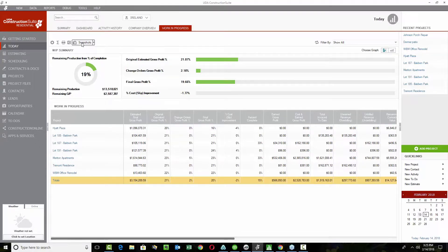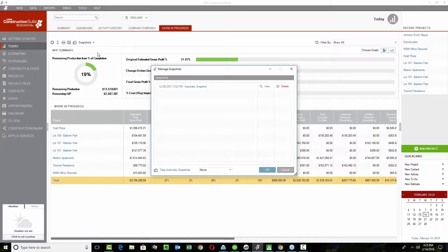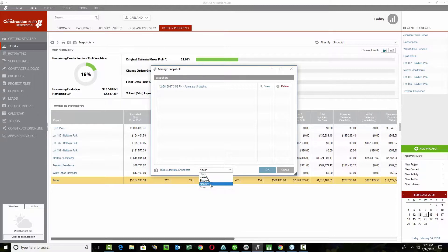You'll also have a really handy option to do snapshots. Looking through some of the topics you were interested in learning about today, snapshots may be a clear catch for quite a few of you. Snapshots allow you to literally take a snapshot of the WIP report at any given time, memorize it, and store it so you can track weekly or monthly progression. Some of you may want to look quarterly at your jobs to see what kind of traction you're getting on those projects.